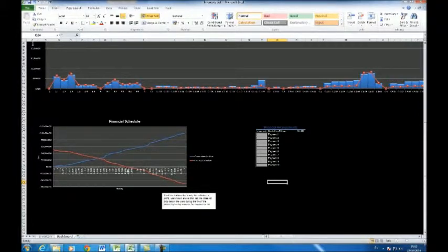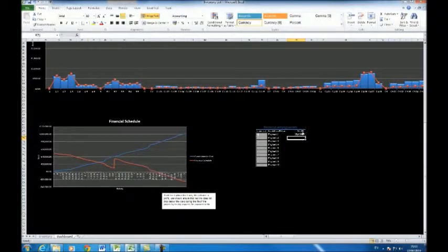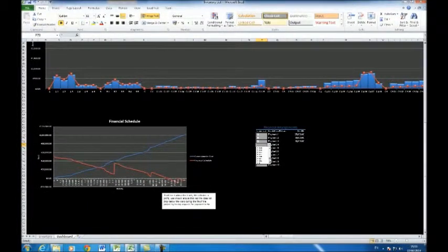To demonstrate the application of the financial schedule, proceed to the financial arrangements. Here, the user can input when they receive money for an activity and indeed how much they receive also. From this, the user will be able to see from the graph just when they'll need to acquire more funding. Repeat as required to plan the cash flow and save the data. From here, the user will be able to determine when they need more funding when the red line goes across the x-axis.